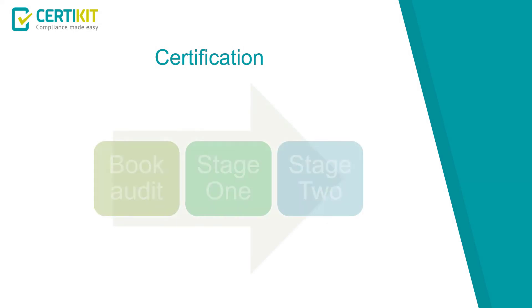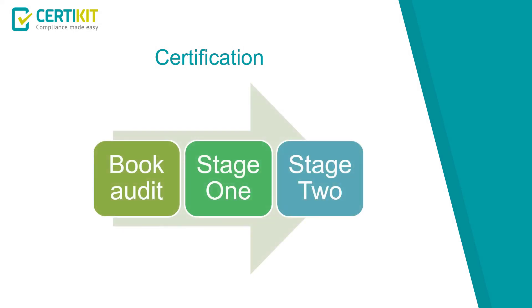Once you're at this point, certification is a two-stage process, and to meet your timescale objective, you may need to get an appointment in the calendar early on if your registered certification body gets booked up a long way in advance.